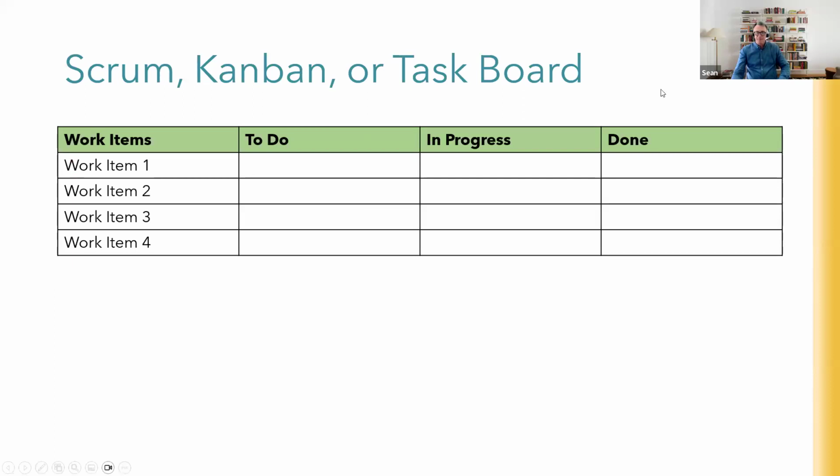Basic Scrum, Kanban, or task board. So over here, I would call this your backlog, sprint backlog, iteration backlog, and then they come from here into the to-do when they're ready. So you might choose 3 of these items. They come across for this. Well, actually, they should all come across. You shouldn't leave things in the sprint backlog. So they'd all come across. We're all ready to start.